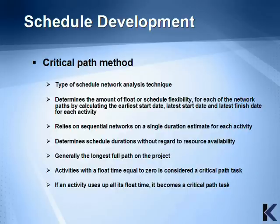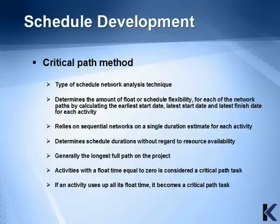The critical path method is another type of schedule network analysis technique. It determines the amount of float, or schedule flexibility, for each of the network paths by calculating the earliest start date, the latest start date, and the latest finish date for each activity. It relies on sequential networks and a single duration estimate for each activity, and it determines schedule durations without regard to resource availability. The critical path is generally the longest full path on the project, and activities with a float time equal to zero are typically considered a critical path task.